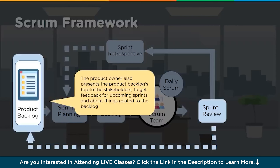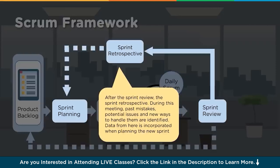The product owner presents the product backlog to stakeholders to get feedback for upcoming sprints. For the next sprint, the product owner speaks with stakeholders to understand what needs to be delivered and the priority. Then the sprint retrospective happens after the sprint review - during this meeting, what went well, past mistakes, potential issues, and new ways to handle them are identified. Data found here is incorporated when planning the new sprint - it works like a lessons learned discussion.